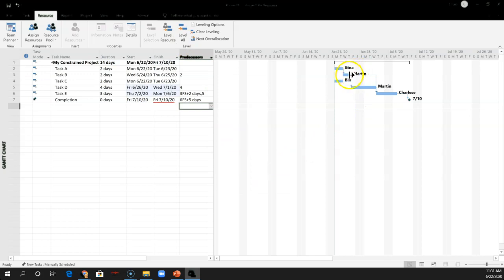We did a little bit of adjusting, but now we had this total project buffer, which was flexible. We also had this buffer on this line, which was flexible. And notice, we are still within 14 days. Instead of going up from 17 days to 21 days, we actually dropped a little bit down to 14 days with our buffer.